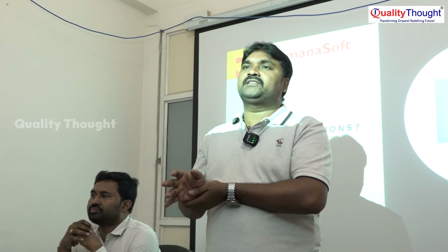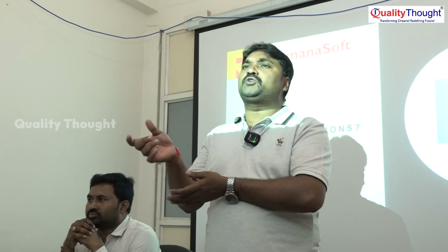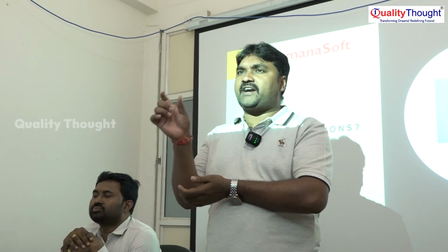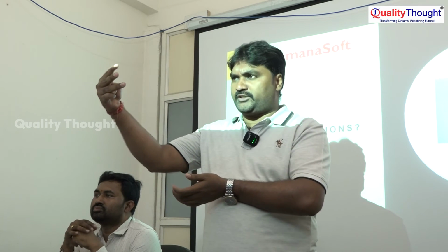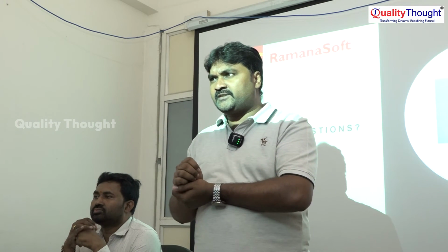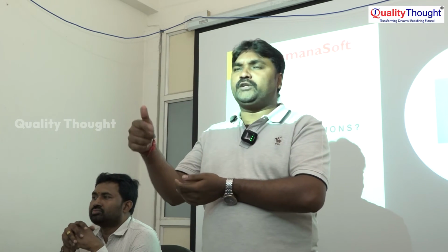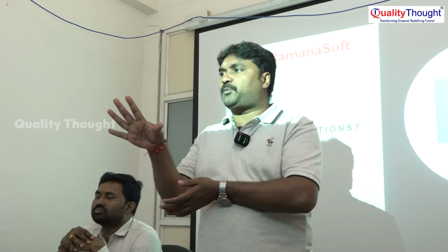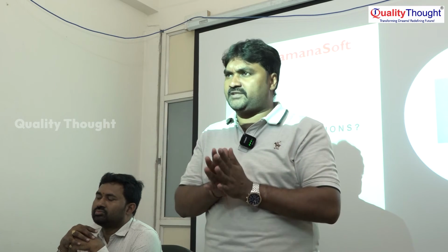The Scrum Master. If you have any questions or any challenges, whom should you discuss with? The Scrum Master. Every day we have a status call. In the status call, you have to give a status update on 3 questions. What are those 3 questions? What did you do yesterday? What are you doing today? And do you have any obstacles or challenges in the project? You have to explain these 3 points to the Scrum Master.